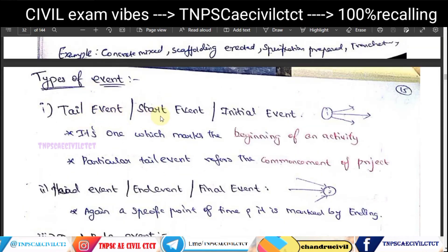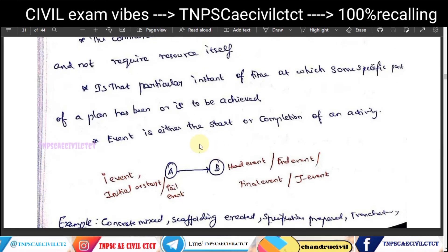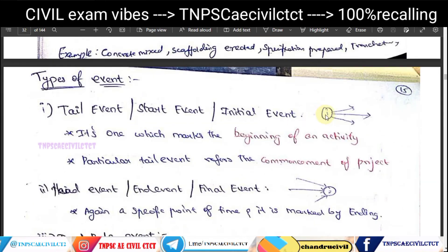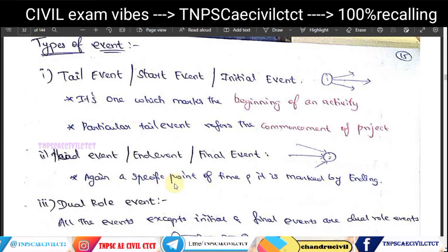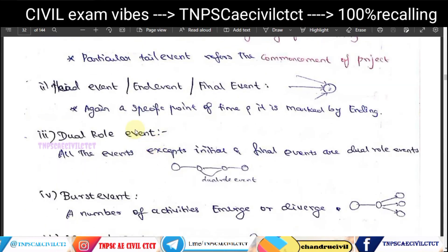The first type is the tail event, also called the start event or initial event — this is where the activity begins and a node is created. The second type is the head event, also called the end event — it represents a specific point in time where the activity ends.